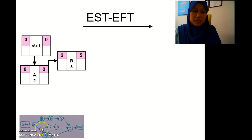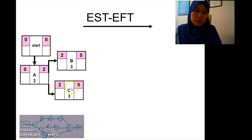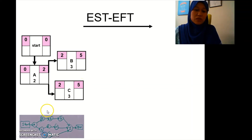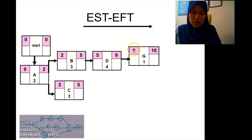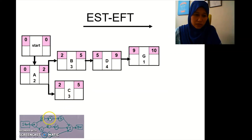After A we have B and C. Two plus three is five for both. Then B goes to D — we bring five here, and five plus four is nine. After D we have G, so we bring nine here: nine plus one is ten. We're done with the first row.